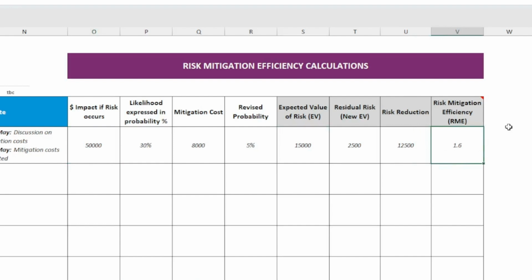If this doesn't work, if your executive management, whoever, doesn't really understand RME, it might be easier for you to run through those numbers. Okay, we have $50,000 impact with 30% probability. Okay, we could spend 8,000 and that would reduce the risk to 5,000. All the rest, for me, it's multiplying numbers with probability. It's not very intuitive, depending on which business you're in. Some businesses, yes, that will make sense, then use this. But otherwise, those might be sufficient.